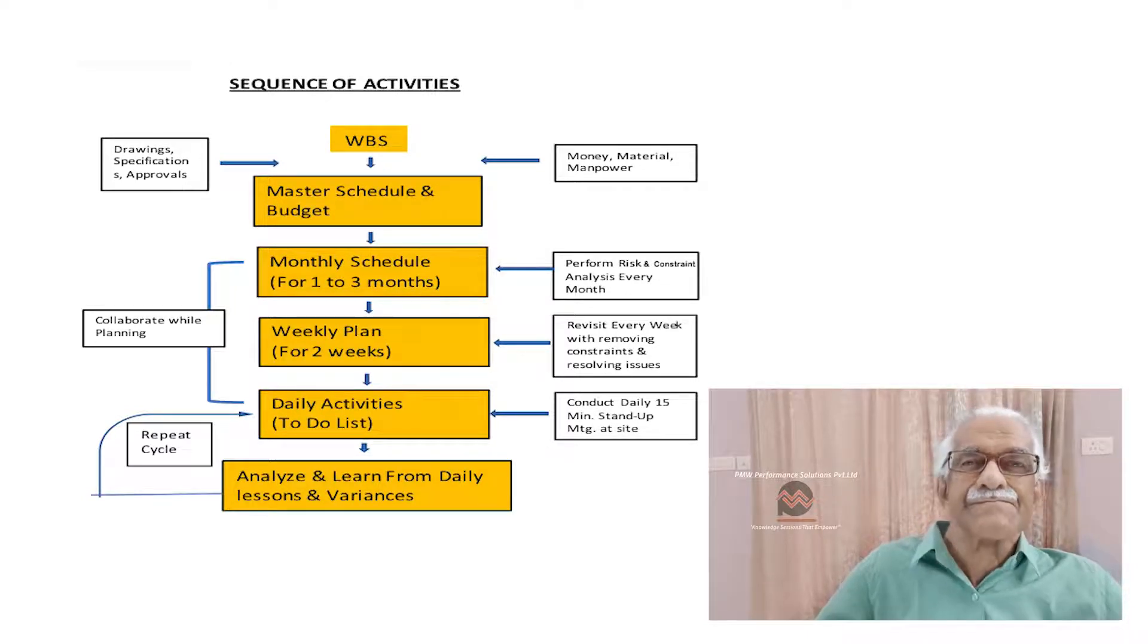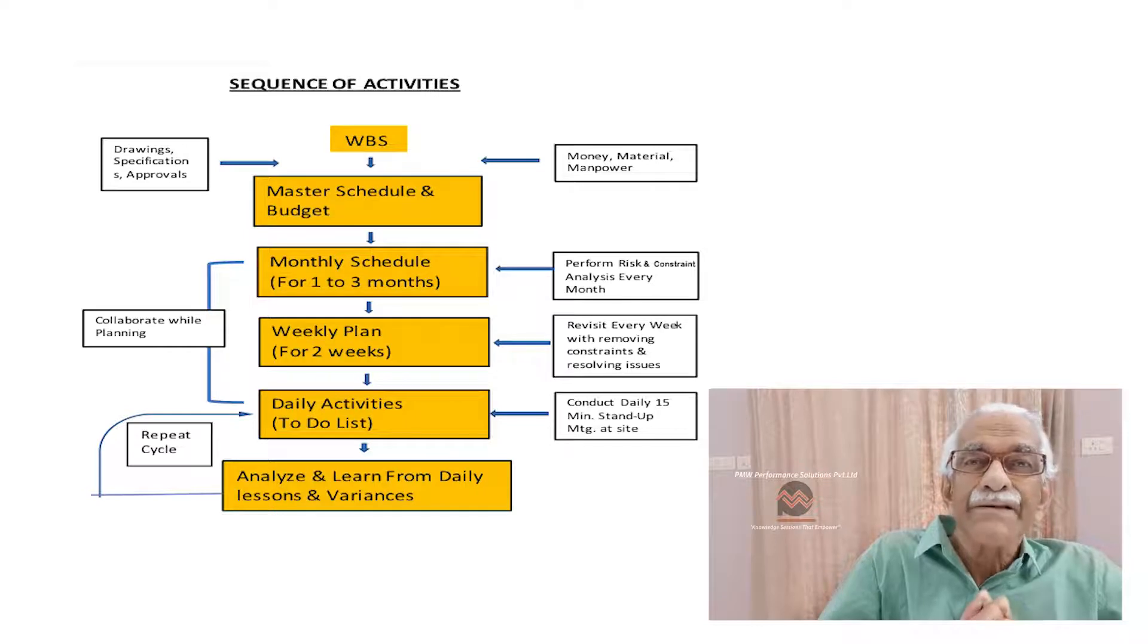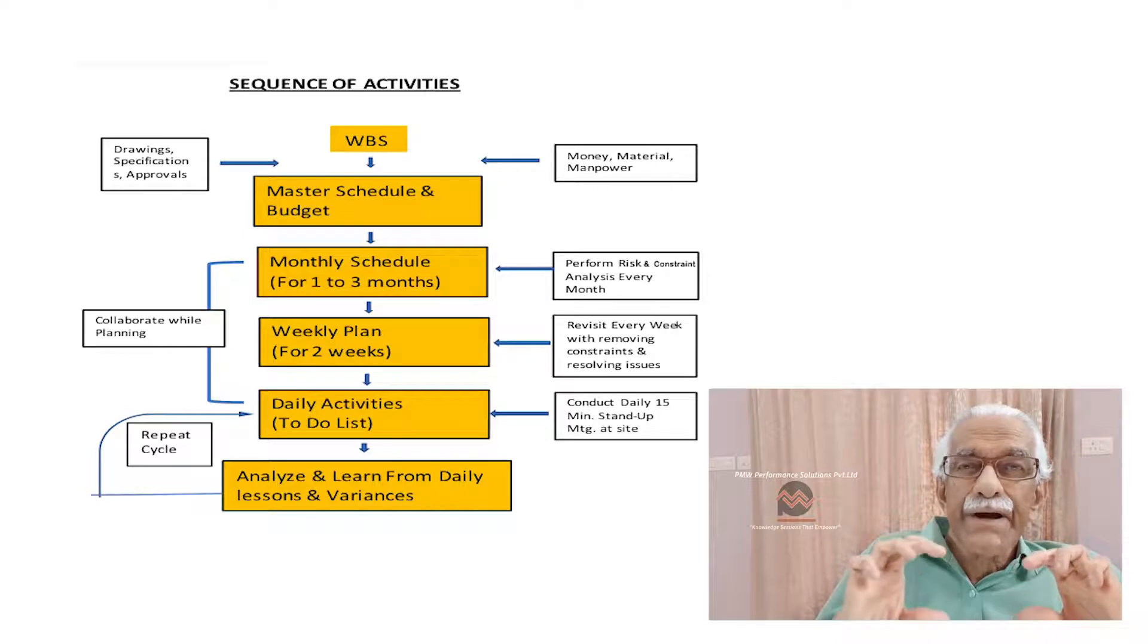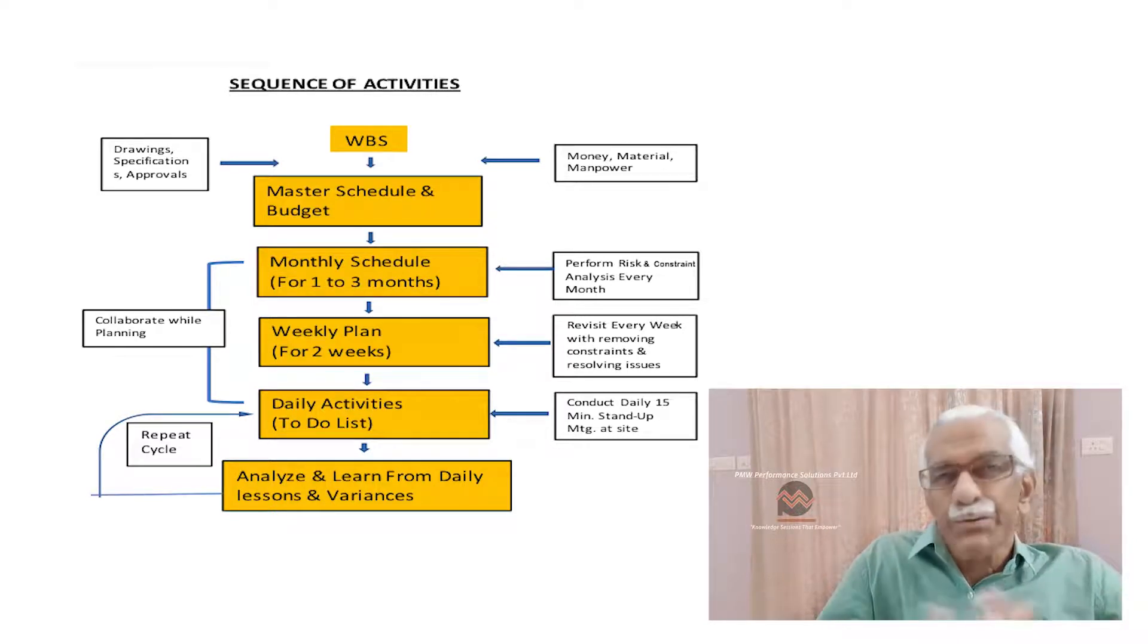Step number five. Break that monthly plan into weekly schedules. Now, in that weekly schedule, you need to micro plan the activities because now we are going into a stage where you have to execute those activities. Micro plan for one week or maybe for two weeks. You can even make a two week plan. Now, don't forget, this is a breakdown of the monthly schedule.